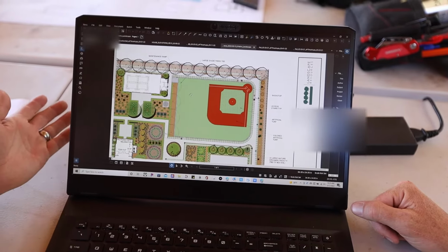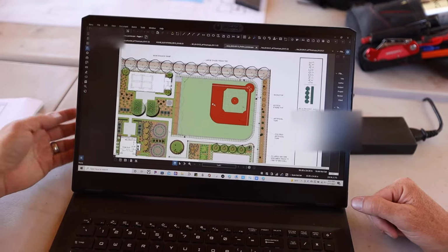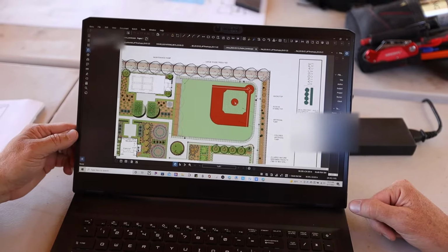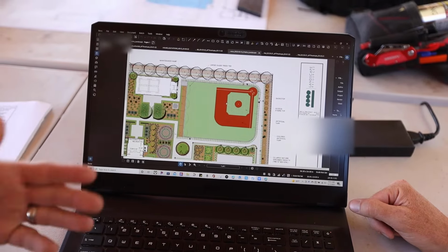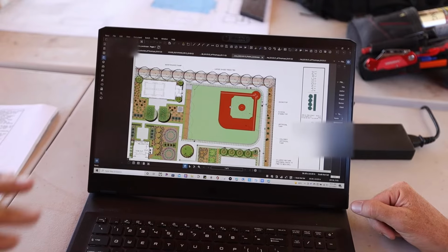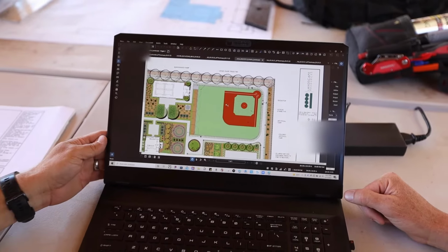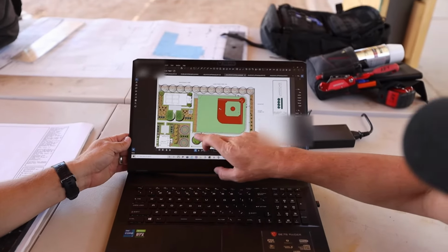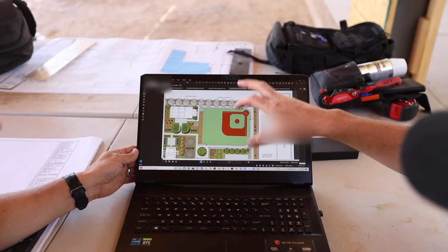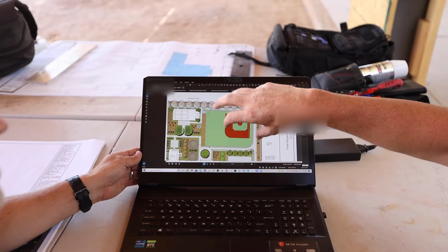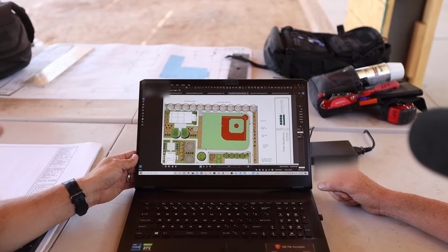Part of the reason that we did all of this work too is so we can give this information back to the civil engineer so he can double check our calculations for this retention basin and make sure it has the correct volume. Because if it needs to be lowered for any reason, we need to bring the grader back out here and lower it down a few inches in order to keep our calculations. And then you've added this vegetation all the way around, so this can be a beautiful element instead of just a retention basin. Now we've beautified this essentially to have this amazing creation in the northwest corner or northeast corner.